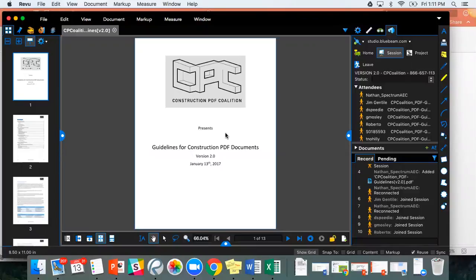But I think the challenge going forward, and some of the other owners or architects who have worked with owners can speak to this, is the handover documents, and at the end of the day, how does all of that tie into Maximo, Archibus, all of those other systems that are used for space planning and CMS systems. So I think that'll be an interesting focus, in terms of maintaining models plus maintaining updated documents after the project is occupied.